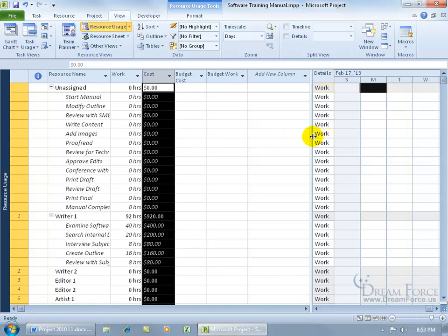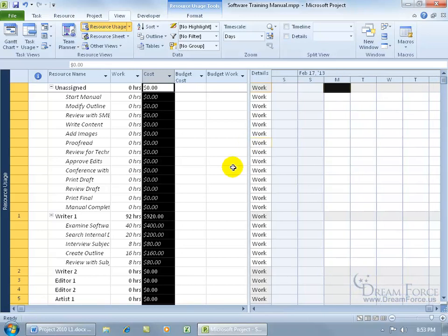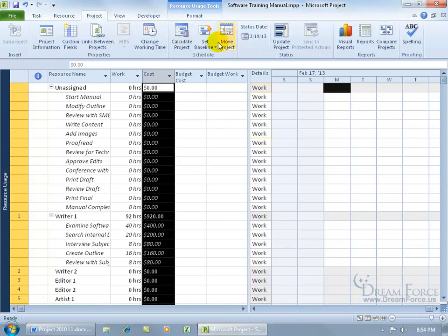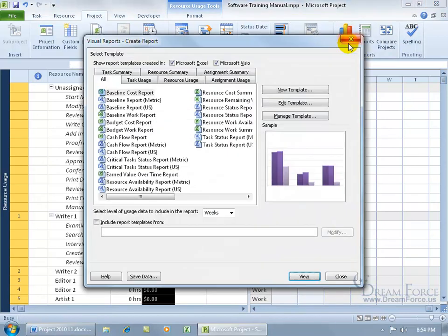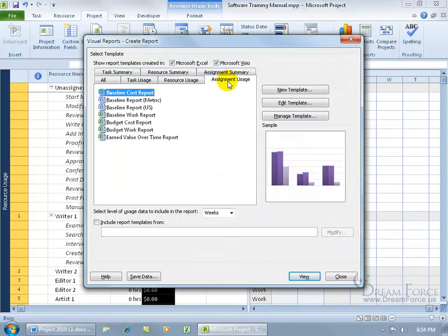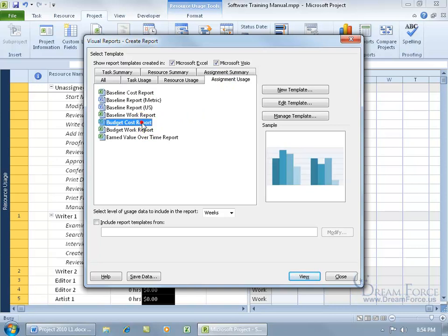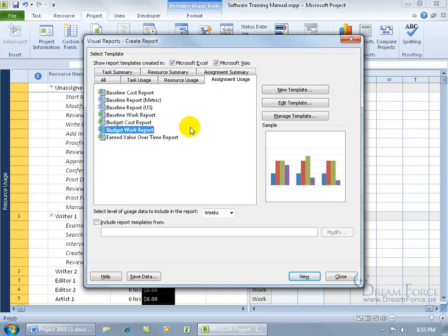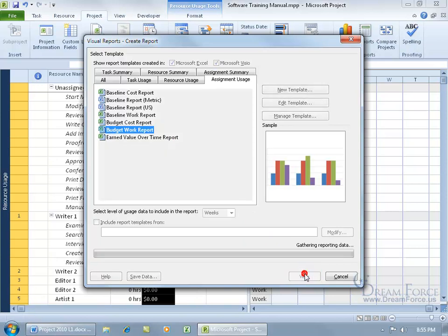Click and drag the split bar back and double-click to snap it to the closest column. As a side note, we haven't talked about reports yet — that's for a later training video — but if you want to view a graph of your budget in Visio or Excel, click on the project tab, go to the reports group, click on visual reports, click on the assignments usage tab, and you can do it for budget cost or budget work. Select that and click view to pull it up in Excel.